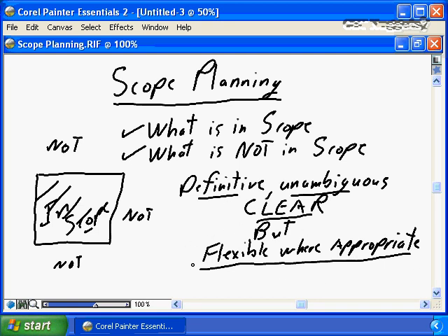but it's flexible where appropriate. It doesn't truly impact the planning process, doesn't truly impact the work or the cost to the project to give the homeowner, yourself, the flexibility to determine the colors of each room much later in the project. Maybe you would put a statement in, the colors for the rooms must be determined 2 weeks prior to the painters coming on site, for example. That gives us flexibility where appropriate.